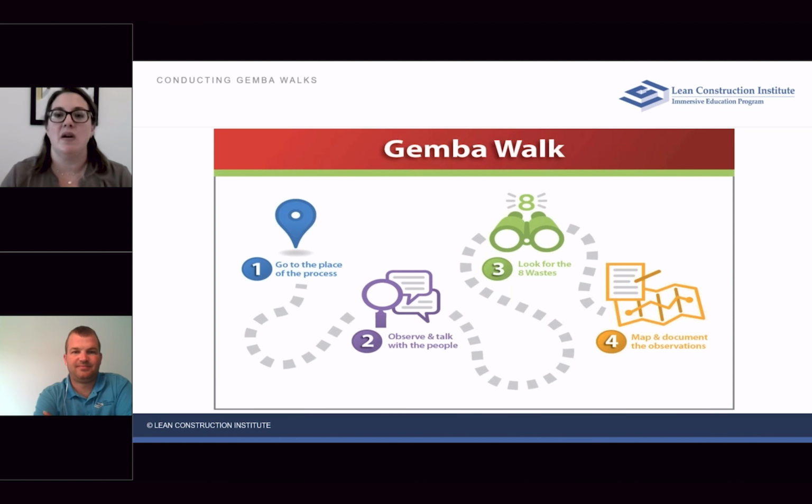What are they doing? Why are they walking across the office? So it's not about being perfect and being able to perfectly define that. It's about seeing that opportunity for a possible improvement, then mapping and documenting those observations. Like Ryan said earlier, that checkpoint, right? We made a plan, they're doing it, let's check on it, what's happening? The ideal state is this, the current state is this, there's a gap. Why do we have that gap? So then being able to adjust that plan to close that gap between current and ideal.